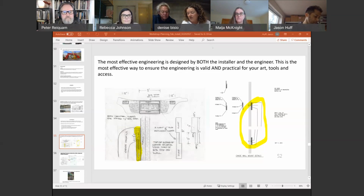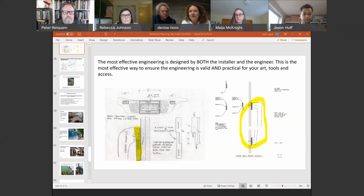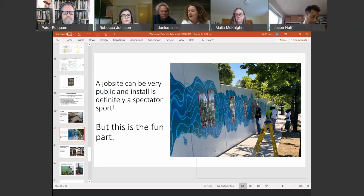The crane that you saw came in for only 1 day just to do that one piece, and the rest of the time we had a big forklift there. That right there is probably 8,000 to 10,000 for just those pieces of equipment. But then you can look at Melvin's piece along the sidewalk. That took 2 or 3 days, and it was probably 3,000 or less. We had no equipment in there and didn't have to close anything off. So it's a big range.